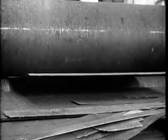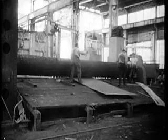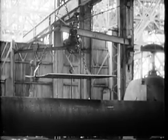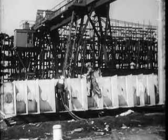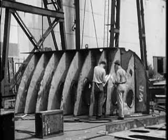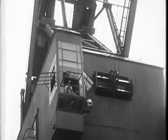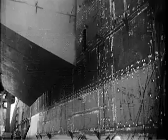While over in the rolling shed, monster bending rolls shaped up the plates that had to fit the slowly growing curves. Steel plates and more steel plates, sheet by sheet, were routed according to their markings to final locations in the big assembly. Then, on the skids, away from the hull, the sub-assemblies grew. Off by themselves, they were free from the flow of materials and work traffic at the crowded hull. Whole sections of the ship, the bow assembly, the elevator platforms, the gun sponsons were assembled separately so that fitters and welders could work more easily. Each unit was erected on schedule as it was needed in the larger scheme of things.